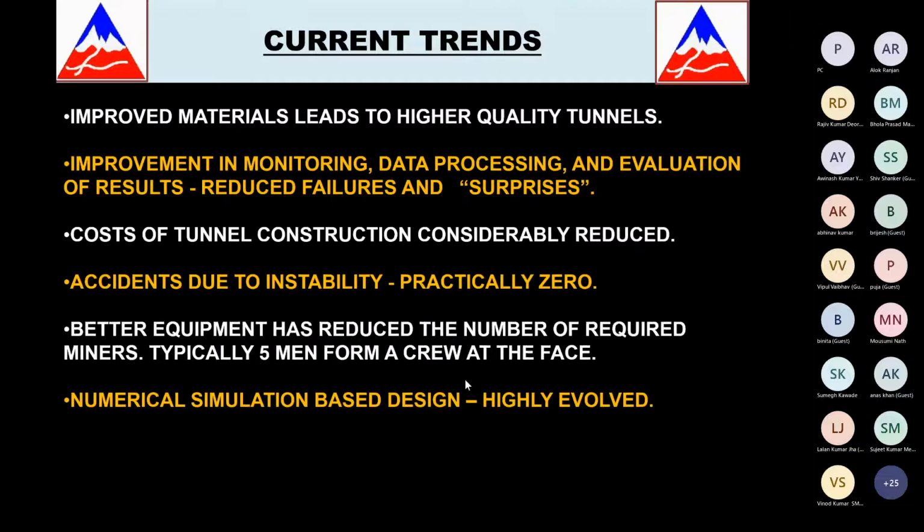Cost of tunnel construction is also considerably reduced where observational techniques are being used, because we are putting only the support which is required, and not what is written in the contract. We actually put a support today as per what is needed. So where there is very good rock and there is no support required, we don't put support. Now, accidents due to instability are practically zero.